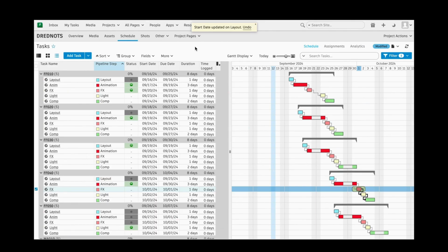And in this case, I defined all those steps. I defined how long they take. I defined those dependencies. And then I can already see how that applies on each asset basis and across the show. And then I can easily make adjustments to those, move things around, maybe some take longer or shorter, and I can quickly get a rough schedule for the entire show.